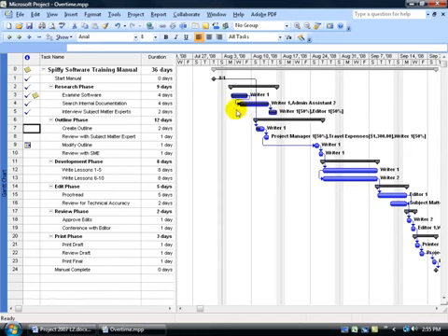Not only that, but because these tasks here aren't directly linked up to this one down below, you can see that Rider 1 working on this task is going to be working at the same time on that task as well. So in a perfect world, I would have this task finish, then start on the next task, then that task, and then go to the next one, and not have the relationships or links broken here, so we can continue on in a continuous format. The relationship that I like best again is when this task must finish before the next task can start.